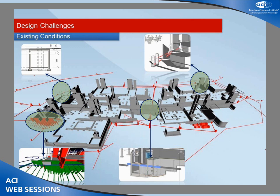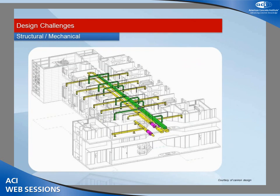Highlighting a few of the issues we had to deal with: in the bottom left, that's some of the modeling we did of the shoring. We modeled the shoring and tiebacks to illustrate the relationship in 3D between the tiebacks and the foundations of the building — by doing that we uncovered a lot of issues and made sure the tiebacks would work before hitting the job site. Top right shows some existing drainage and mechanical systems that needed to be coordinated with the foundations. Bottom right was an existing electrical duct bank on site that we needed to coordinate the structure around — we modeled that in 3D as a placeholder so that as the design evolved we could see how things were going to flush out.